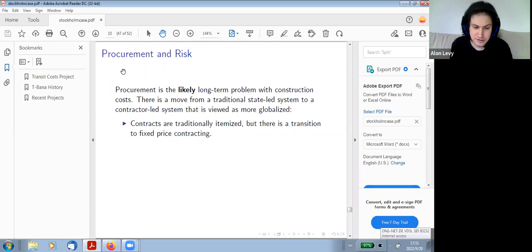This is also something that a lot of the contractors hate because they don't want to tell you exactly what they're doing. They're worried about this kind of nitpicking. Maybe they want to get paid earlier is one of the reasons I've heard. So they prefer fixed price. The problem is fixed price means that all the change orders increase their cost dramatically.